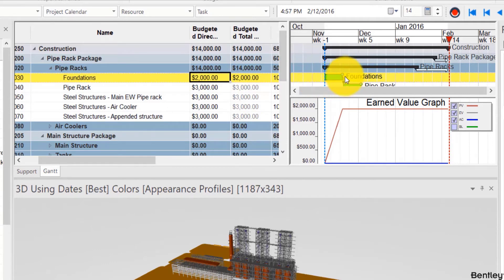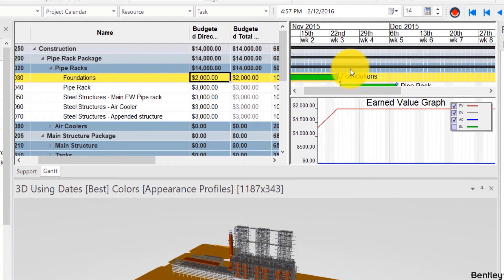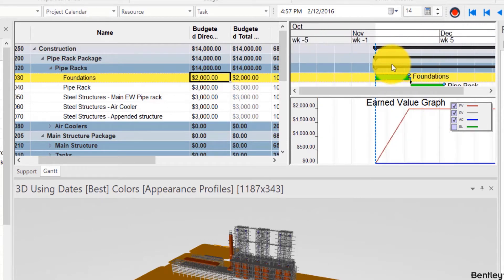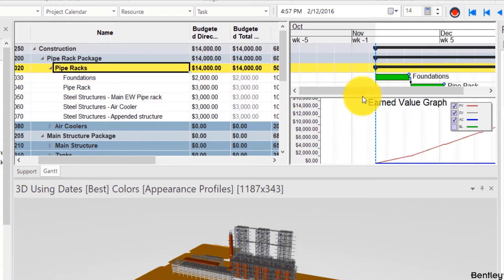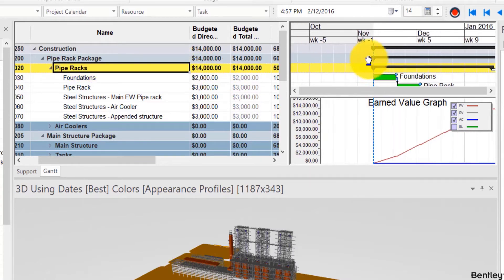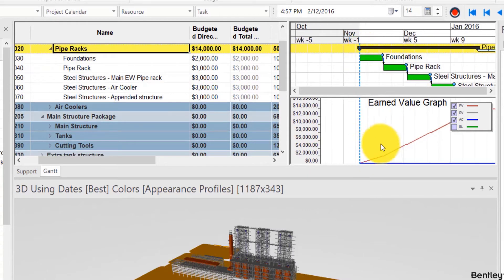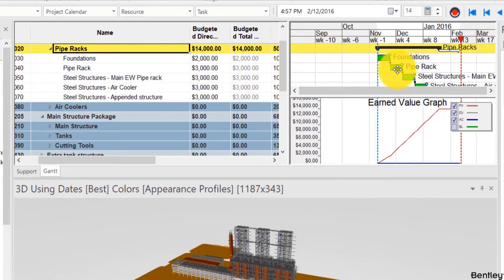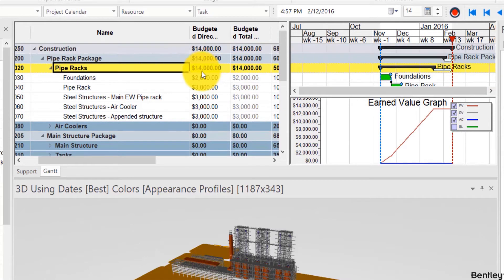We can zoom in and pan. Now as you select more tasks these straight lines resulting from each task will sum up to eventually become something like an S curve.